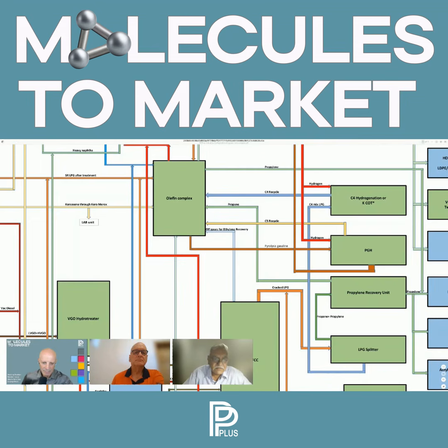And if one were to go for KCOT, as we were discussing yesterday, if KCOT is to be utilized as a technology, then we have no option. We have to go only to KBR, because KBR is the only licensor for that. So that technology will have to be outsourced by the owner themselves, because they will not part with their technology with the licensors. But certainly they can give it to the owners. And so the technology process may be slightly different. So insofar as the petrochemical mother block is concerned, I think to my mind, there is no way you will have to do technology selection.